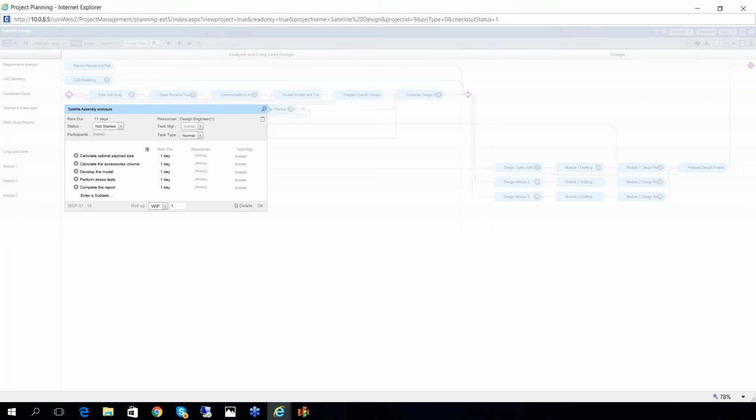How those details get managed, in what sequence those activities get done, the project manager does not care. The rest of the organization does not care. That is a very local detail for the IPT lead to manage. And they can manage it without encumbering or affecting the critical path of the project. And again, let's look at the timeline view here.